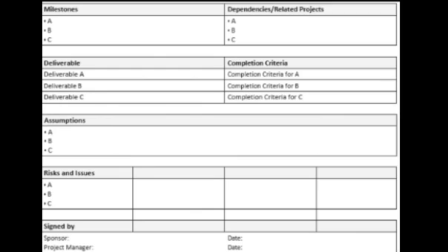And one of the things you are assuming is that the materials to carry out each of these milestones and deliverables will be made available at the set time. Now let's assume your first milestone is 1 week. In that 1 week, let's assume materials were not made available for like 2-3 days. The materials did not arrive. And you've already given 1 week as your milestone. It means you are already running short of time. 3 days are already gone and you've not started.